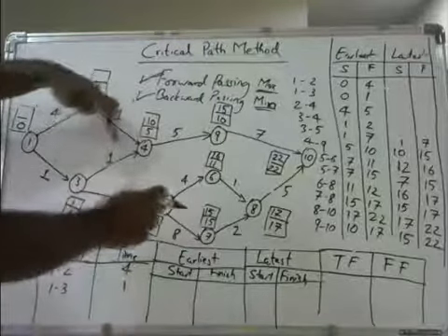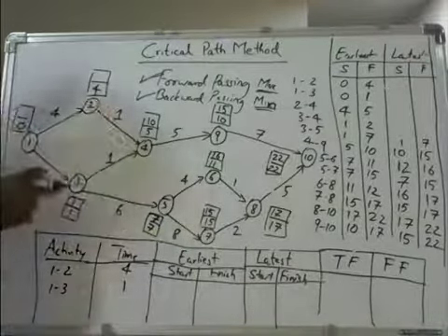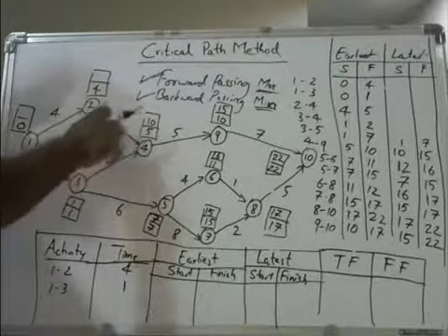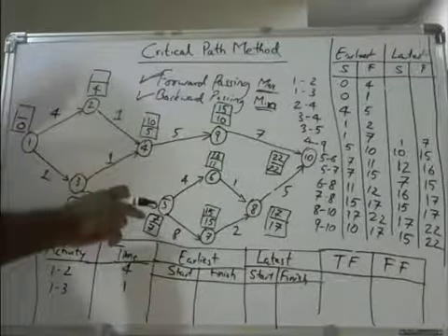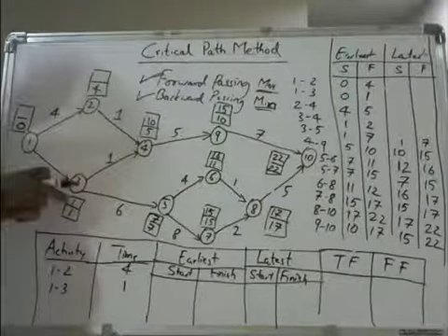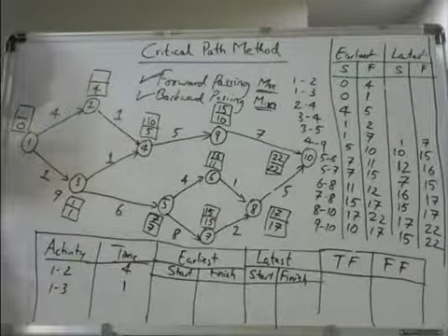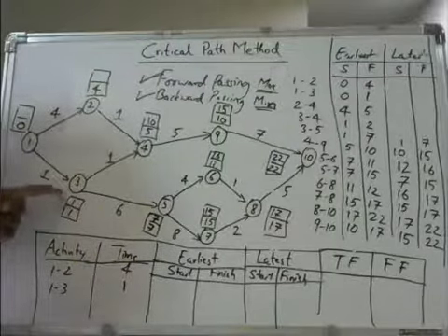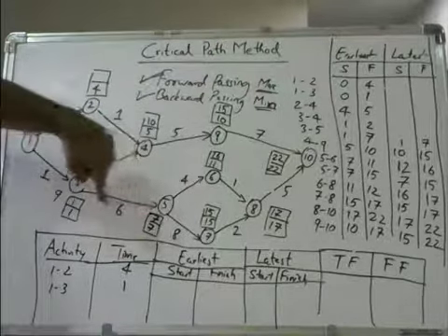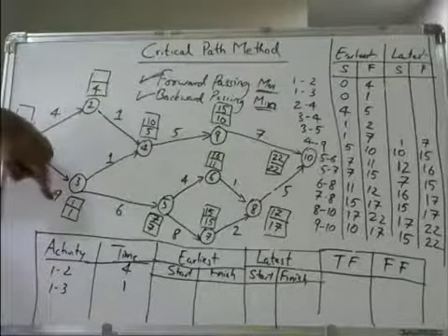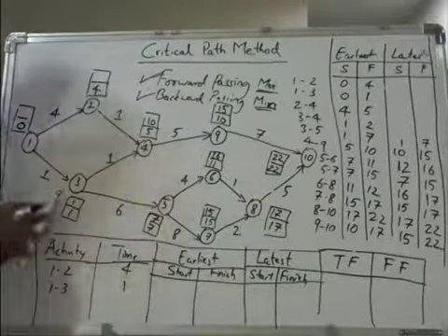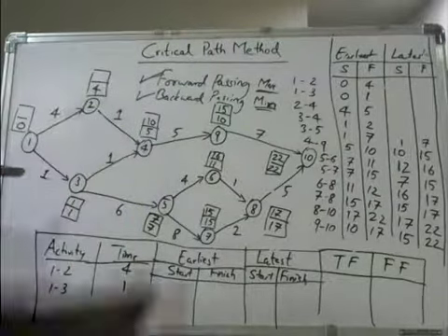Here also you are converging, guys. You have already written 9, but you shouldn't have written it here. 10 minus 1 is 9, and 7 minus 6 is 1. Whichever is minimum you should take. Out of 9 and 1, 1 is minimum, because in backward passing you take the minimum. So I have taken 1. I will rub this 9 out, it is not required.